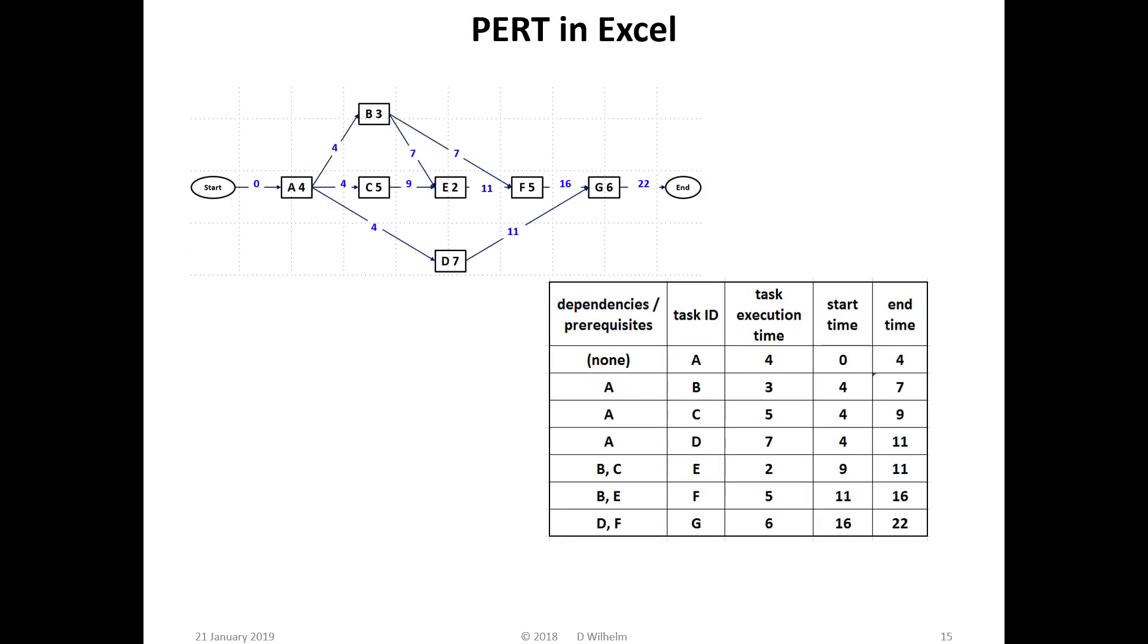A PERT table can be easily converted to an Excel spreadsheet. Just add two additional columns, start time and end time. Start time equals zero for tasks with no prerequisites. For each task, the end time equals the start time plus execution time. The only slightly challenging item is determining the start times.